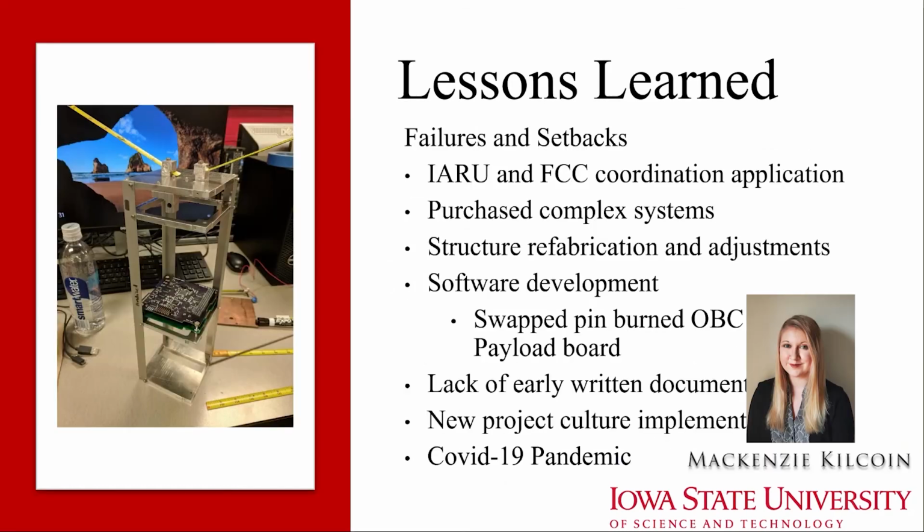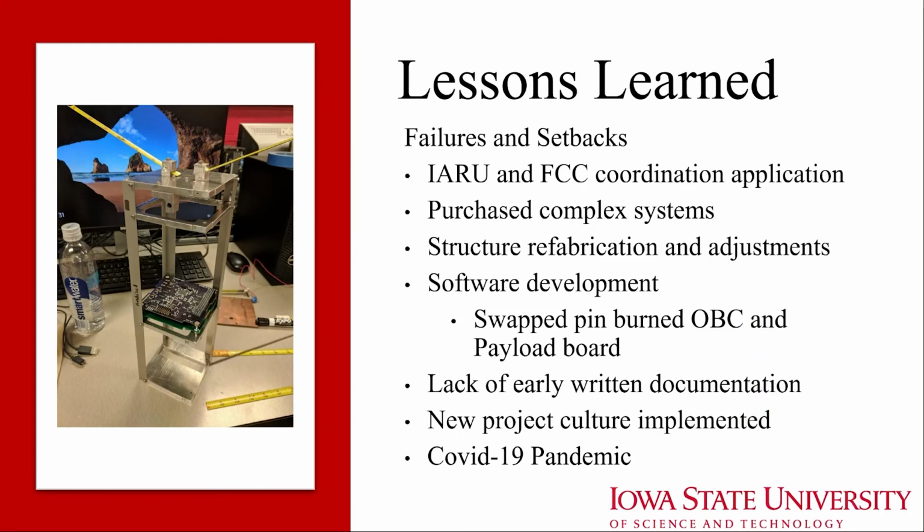Other lessons learned had to do with coordinating our radio to meet IARU and FCC coordination requirements, and then integrating commercial off-the-shelf components into our own in-house designs. We had to refabricate the structure on a number of occasions in order to meet the tolerances of commercial off-the-shelf systems, and thereby also redoing software requirements. Due to a lack of early written documentation on the project, a new project culture had to be implemented, which was especially important going toward the COVID-19 pandemic and further delaying our handoff.